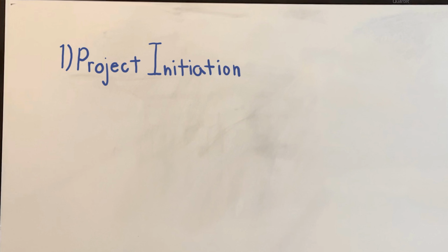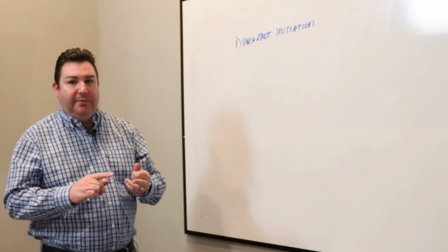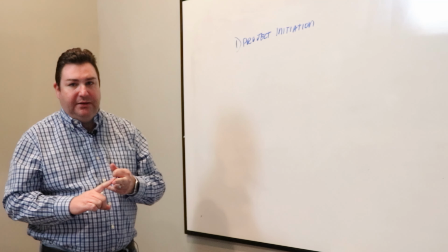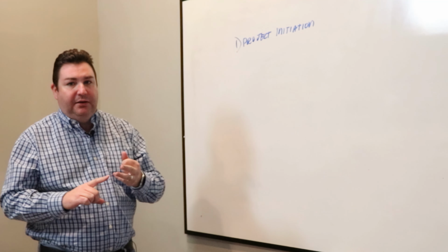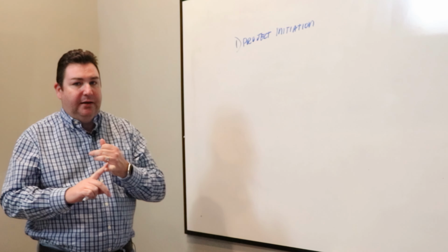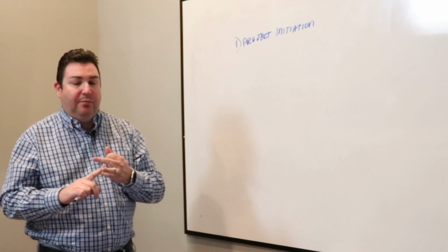Absolutely. So step 1 is project initiation. How would you summarize what you get done at that phase? So in this phase, you're talking about establishing your overall goals and objectives, roles and responsibilities, the scope of the project, what the deliverables are, your initial project schedule, kind of a straw man or a cursory timeline, a financial analysis, and writing your project charter.